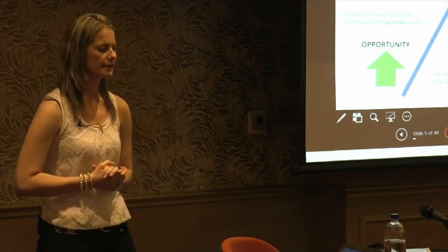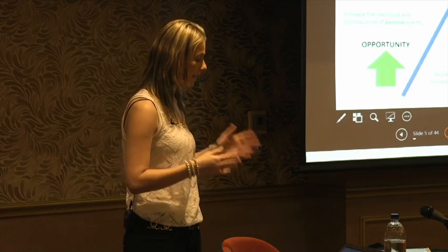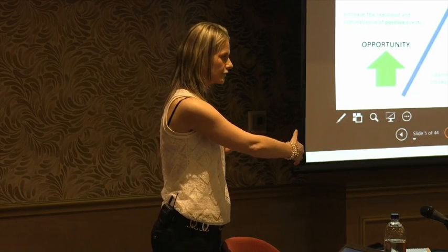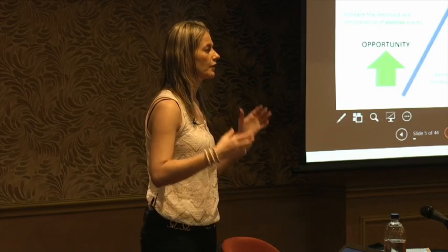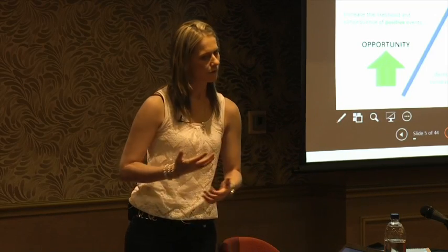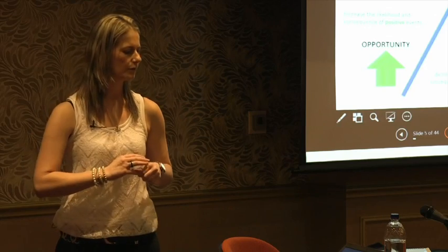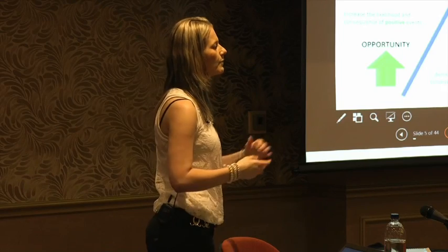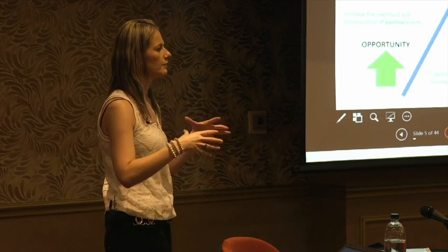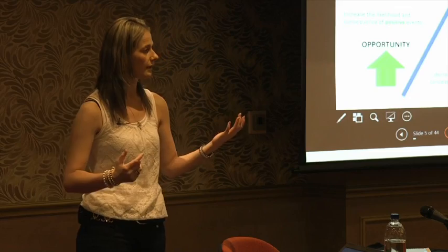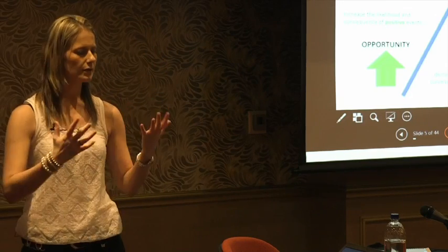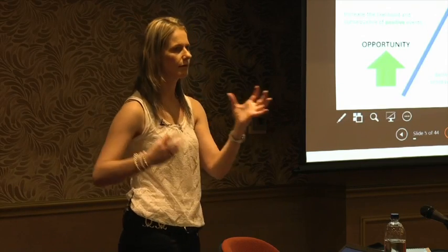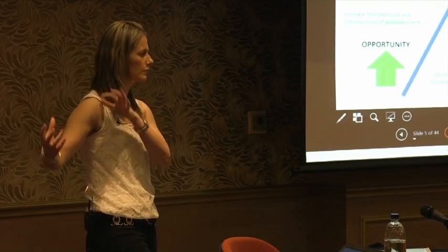So management makes a decision in the opportunity to say, well, apparently, as the economists of the country say, that there'll be inflation next year. So we decide to procure bulk material now. We should know the consequences and the risk we face, so we need to make sure we have a storage facility, preservation is done, etc. But the procurement of bulk material will probably save us, and we can do the calculation. Let's say it will save us 30 million rand worth of expenditure on material. So the opportunity in that is that there could be a cost saving to the project.